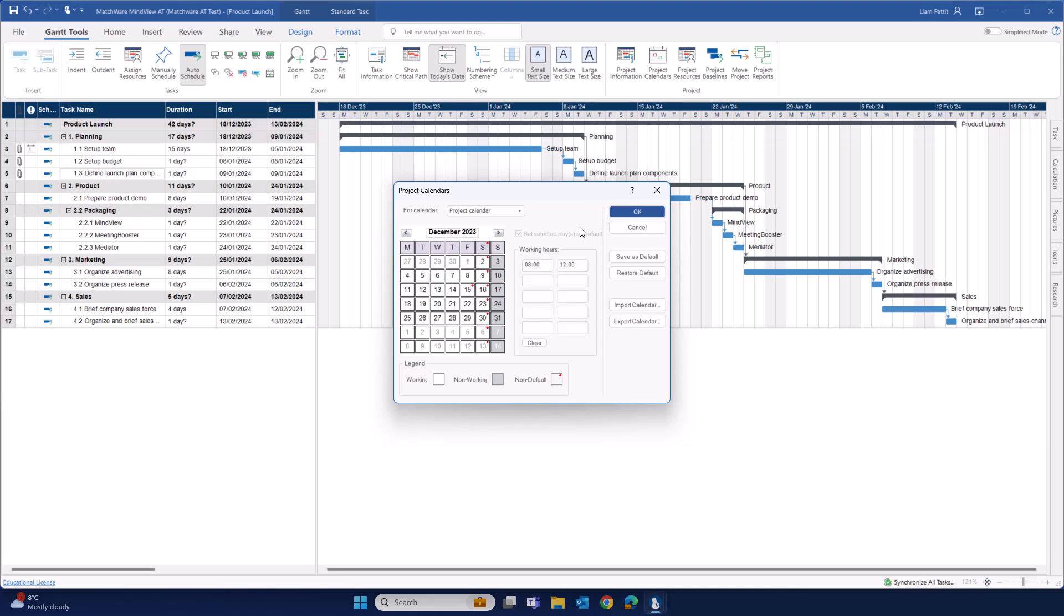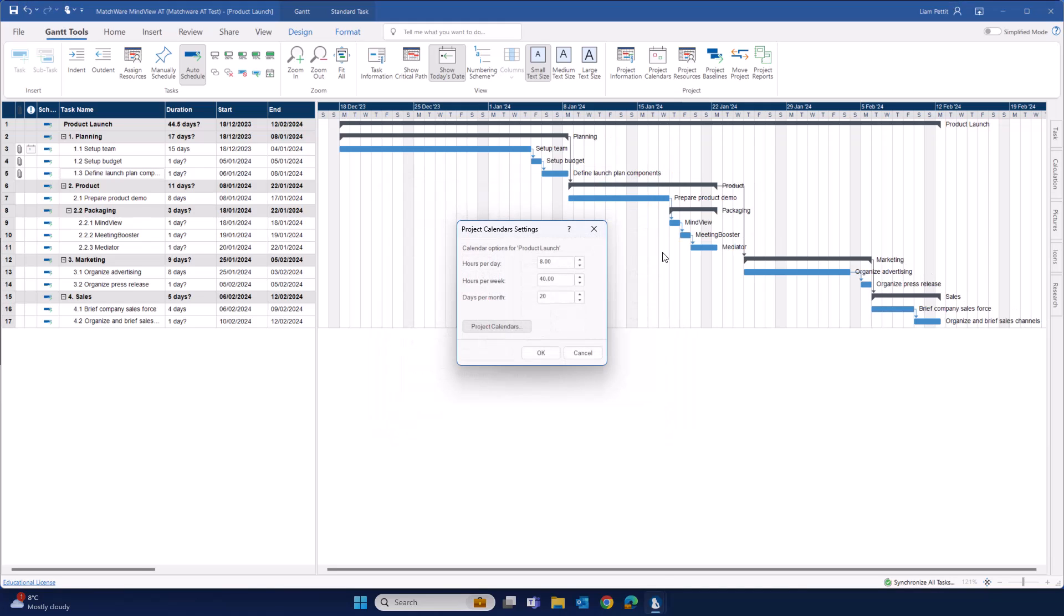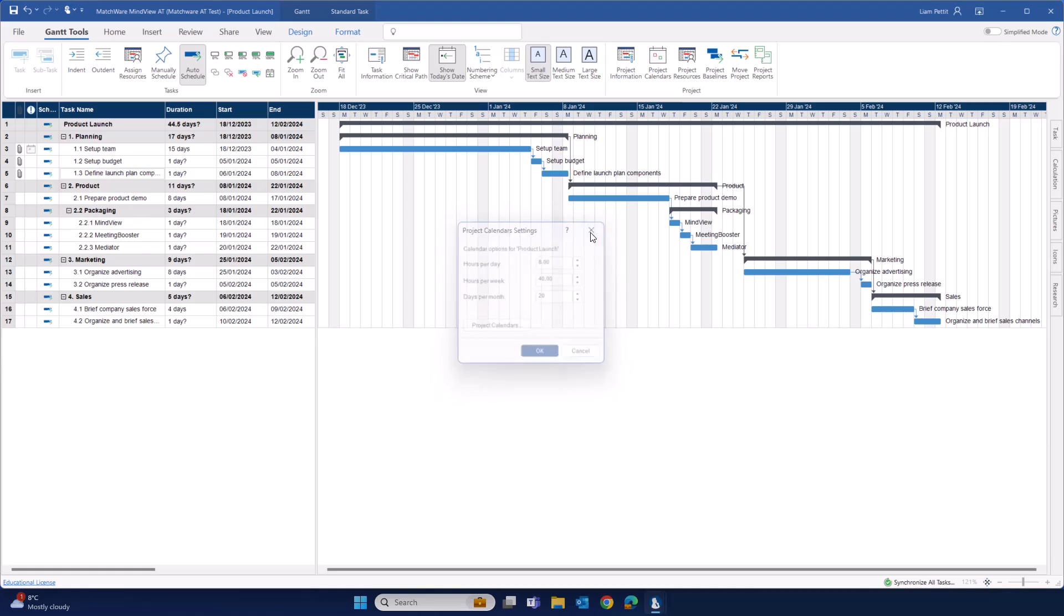Notice in this example, it's even changed the color of the day from grey to white. Any changes to your calendar will also be visualized within the schedule of your Gantt. Notice how the columns of the day for Saturday have changed from grey to white.